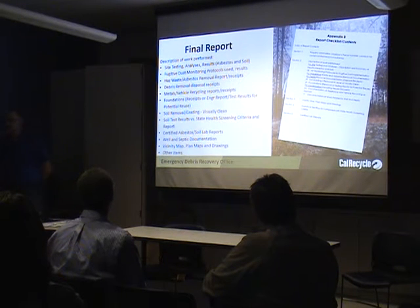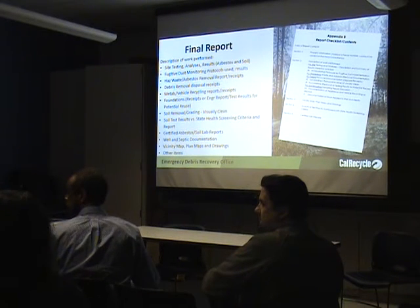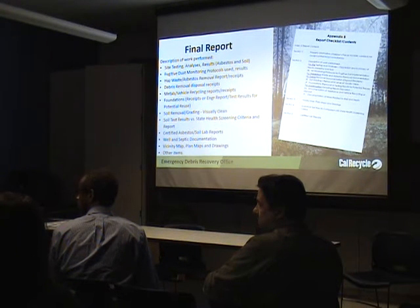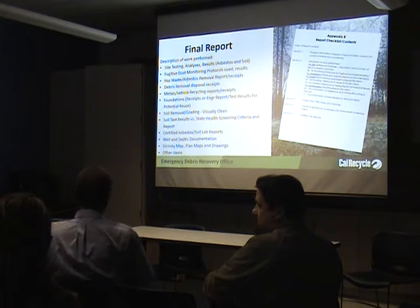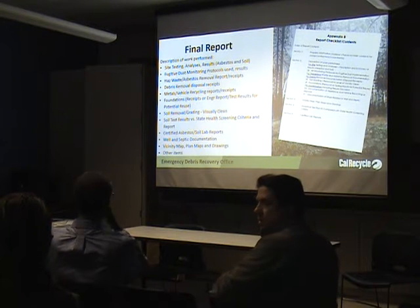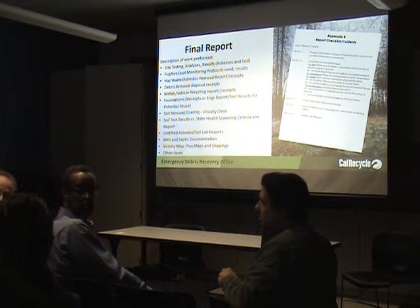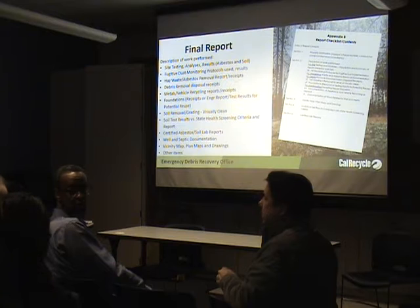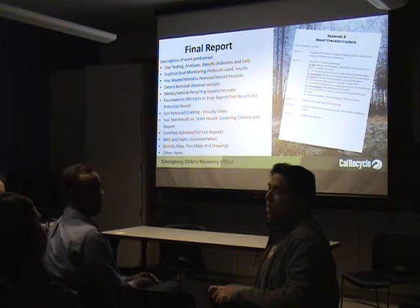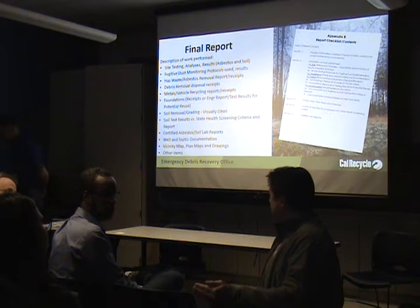Is there a training requirement for the workers? Last couple of fires, in the past, 40-hour HAZWOPER. The environmental contractors should have 40-hour HAZWOPER training, yes, for their own safety protection. But in general, we don't need a HAZWOPER for this work, unlike the work that was done 2 years ago, in 2017, when we required that you had PPE. If you were removing hazardous materials, you would need the HAZWOPER.